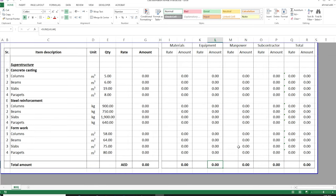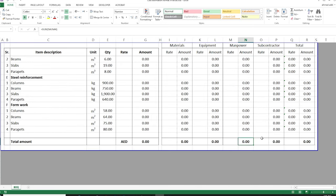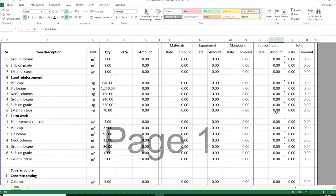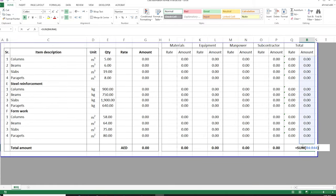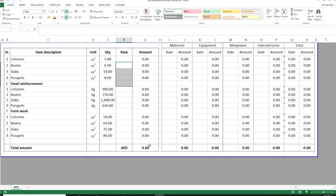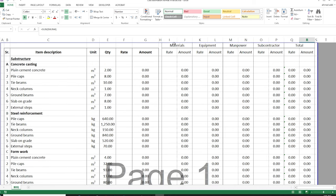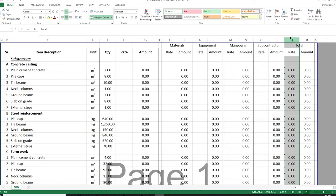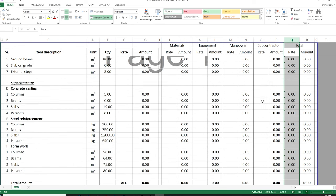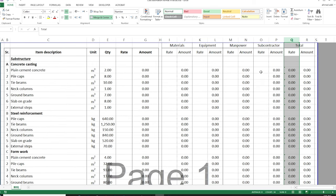If you use the same total cost rate in the BOQ rate column, then the amount you get in the BOQ is similar to the total amount here. But usually what happens is we estimate the cost on this side, and then we put our ceiling rate in the BOQ — which means the cost rate plus the margins we need. This is something we can discuss later, but this is how we calculate this format.